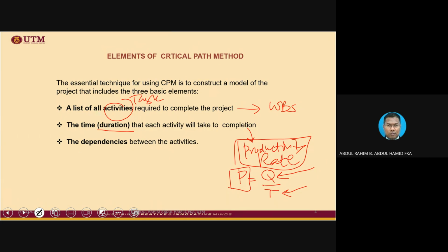Sometimes the bill of quantities gives you the entire quantity of the slab, for instance. Whereas in real construction, we are not going to cast the slab in one go. We are just going to split the slab into sections, isn't it? That is more practical. But then we need to estimate the quantity of a certain portion.